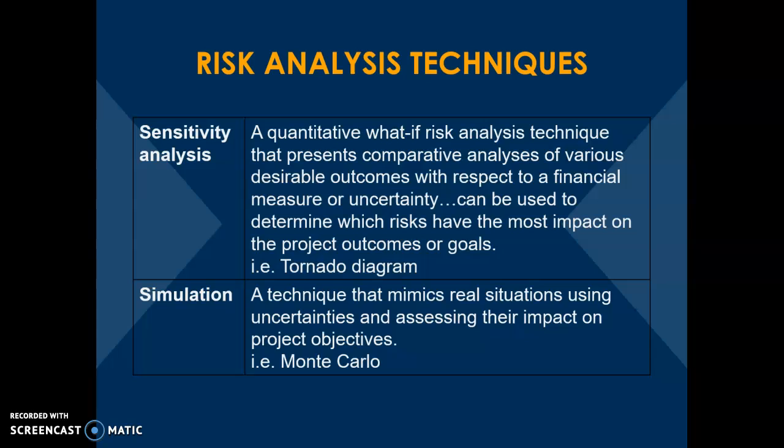Sensitivity analysis is another type of analysis we've done in my engineering economics class. It's essentially posing the question of what if. You can develop a plan based on certain assumptions, but what if those assumptions change? What if you are developing a new product that you think you can sell for $100, but because of competition in the marketplace you have to lower the price to $80 per unit? How is that going to affect the profitability of the project?